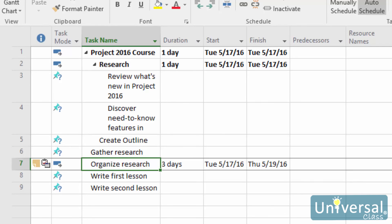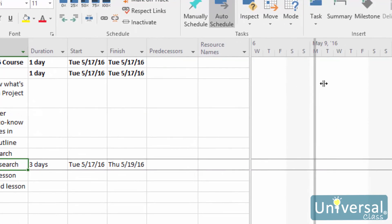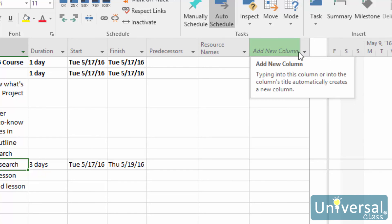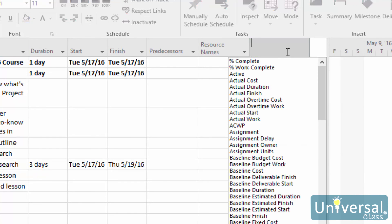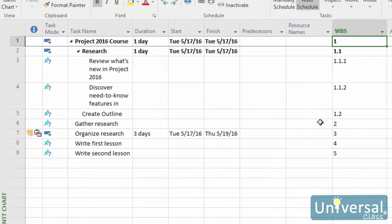To view the WBS codes in your project, go to the Gantt chart view. Go to the Add New Column column on the right. If you don't see it, you can hover your mouse over the grey border here, click the mouse, and then drag it out to the right. Then look in the drop-down menu and select WBS. You can see the WBS code in the column here.